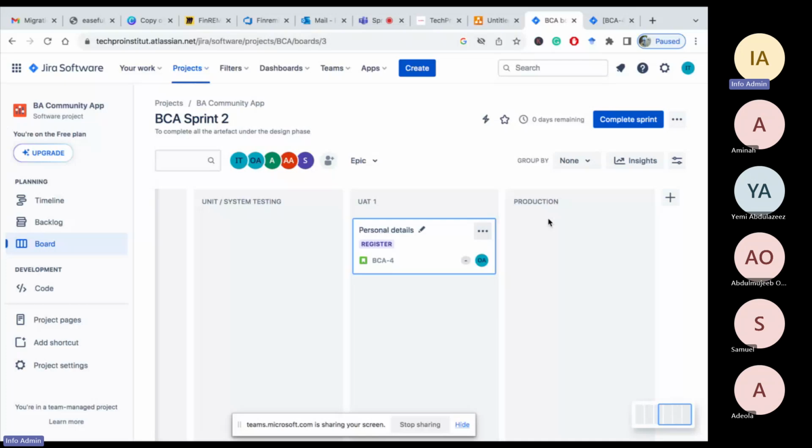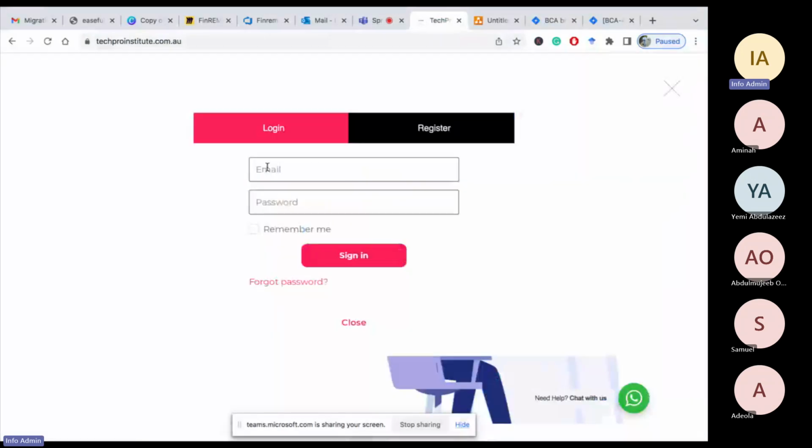And as I said, it depends on the policy of the company. Some companies require that after you've completed UAT, before you deploy to production, it has to go through change request or change management. That's a completely new thing entirely. What that means is that you have to do PVT, post verification, to confirm that what you've done here has not affected anything previously.